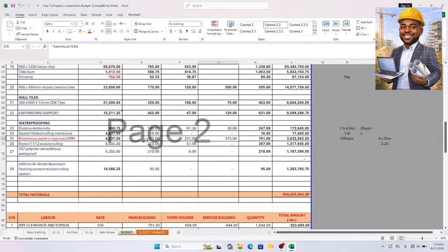Right? So basically, that's what you have. But what we have here is the price per square meter applied. So that's why you just see them. We applied the same price here per square meter for this particular case. But if you want to buy in rolls, a roll comes in 100 square meters. I think it's about 15,000 per roll. I think I got that information from my procurement manager at the time.